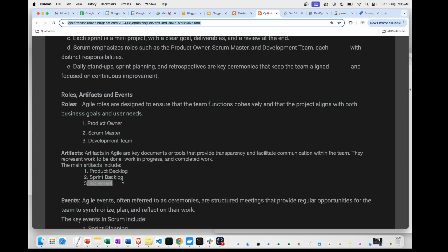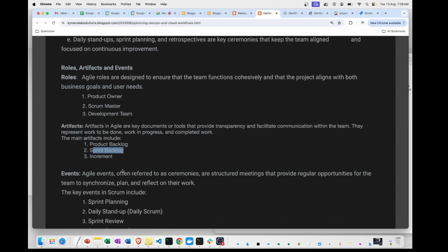Post that, you create one more sprint. You add this sprint backlog and add a few more tasks to the existing tasks based on the bandwidth of the engineers, and you continue with the sprint. So your product backlog keeps on growing based on the requirements and the client's business model. The product owner gives that, and during the sprint the Scrum master, developer leads and managers sit together and assign the tasks, and they will assign the user stories.